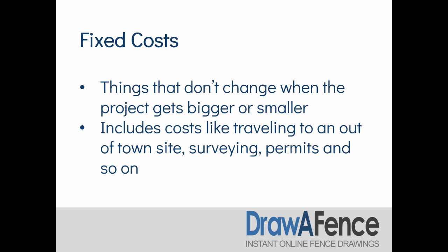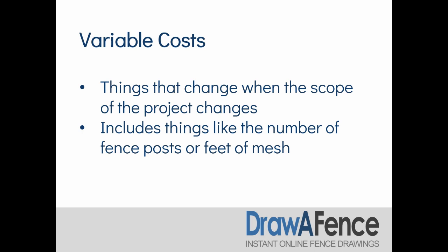Sometimes there's a fixed cost and a variable cost built into things. Like, let's say, for instance, you're renting equipment for a particular project. The cost to transport that equipment to the site and from the site would be fixed costs, but the time-related or the variable costs would be the rental cost for the time that it's on site. So again, if you're doing a bigger job and these are things that you can't quite quantify up ahead of time, you want to think about splitting those things apart and having the fixed cost element and the variable cost element separate.